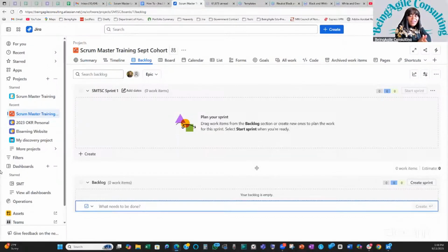So we will spend the first 2 weeks of our program to complete chapter 1 to 4. That's going to be our sprint 1. We are going by 2-week sprints, iterations. Then we will spend the second 2 weeks of the sprint to complete chapters 5 to 8, sprint 2. And then we are done with the project.